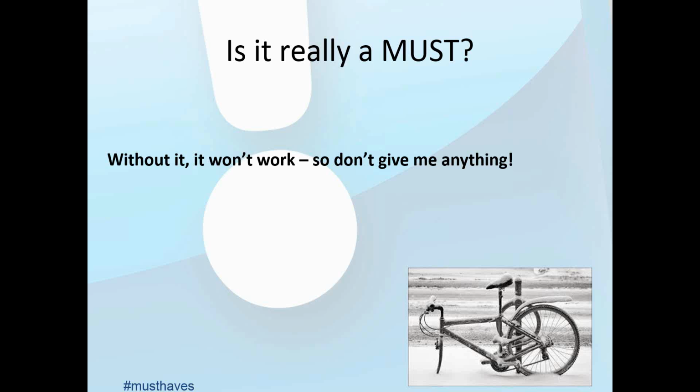What some people do is to say, would you go live? Would you ask the question on the day before you go live and say, look, this feature isn't there, do we still go live? Again, another nice acid test to see whether it really is a must.